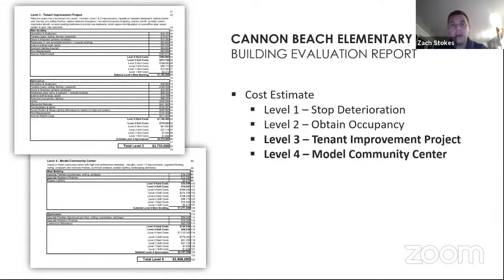We may have to come in there and add a small portion of wall just to support that open edge of the canopy that used to be supported by the gym. Maybe it's a post and beam system. There's a lot of options with respect to how we can do that, but you're right, we will need to do something, and it will ultimately need to be strengthened if you move forward with the seismic retrofit. Does that answer your question?